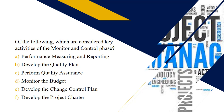Next question: which are considered key activities of the monitor and control phase? There are three options you should select. They are A, C, and D — performance measuring and reporting, performance quality assurance, and monitoring of the budget. This phase also includes governance activities, monitoring the risk and issue logs that you created, and administering the change control process. All of those are associated with the monitor and control phase.